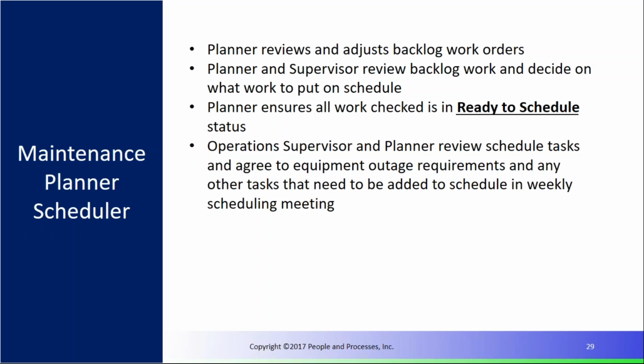In other words, every 2 weeks, we're going to take a Thursday down to work on this line. Or maybe we're going to have 4 hours, or we can arrange, maybe you've got flavor changes or allergen changes or other things like that. You can work in opportunities to do maintenance work. And so you need to be considering those.